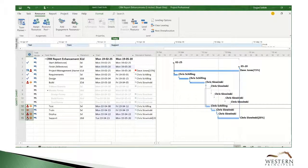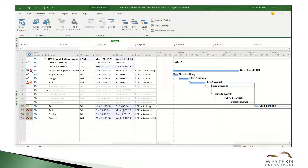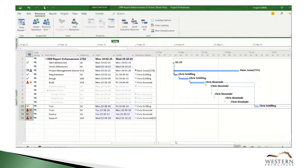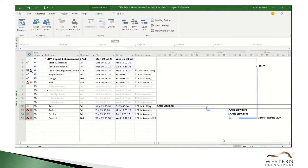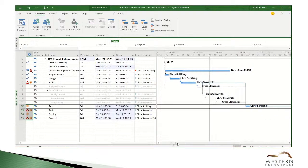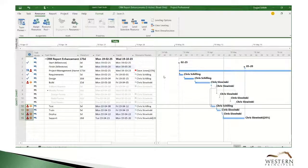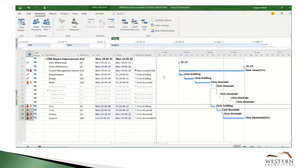The other way we can level is by task rather than resource. By leveling the tasks, not the resources, we push the completion date out to October, but we've reduced the resource allocation. In the next video we'll take a look at swapping out over-allocated resources for resources with more availability during the project schedule timeframe.